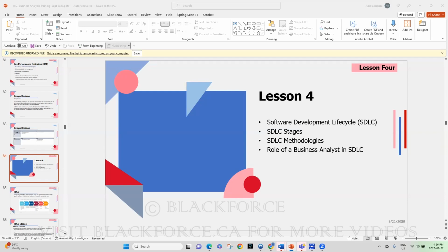We still need to fix it. In fact, sometimes what happens is, let's say we started with 100 user stories, and in sprint one we selected 5 user stories. At the end of the sprint, we've built, we've tested, and one of the user stories failed. That one failed user story may as well be the first user story for sprint two, because we need to fix it.